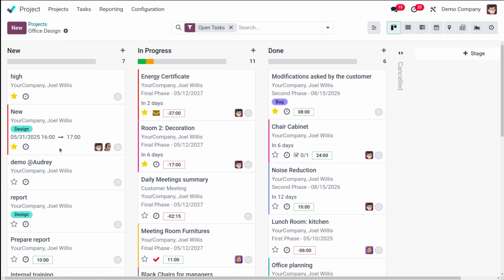Now the next thing, I'll put all these together. So you can even combine these shortcuts. Okay, just follow this order. That is the task name, then allocated time, then tags, then assignee, and finally priority. Okay, so I'm going to demonstrate creating a task with the title Prepare Workshop for 5 hours, school as the tag, at Audrey, which is the user, and which is set for higher priority.